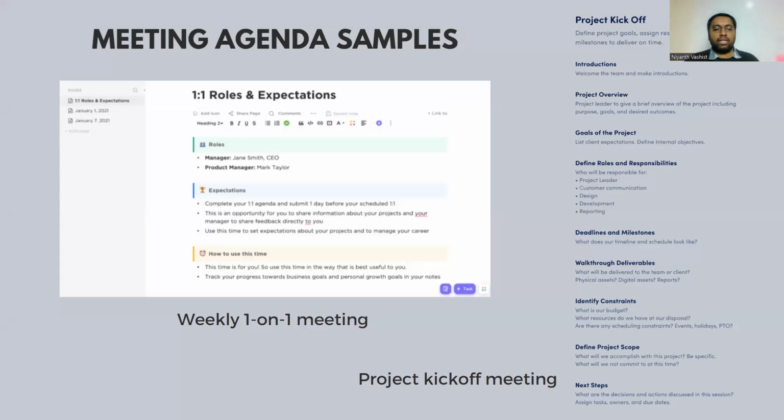Just to give an example, this is how a meeting agenda sample looks like. The roles and expectations have to be given out. So who is coming, who are the people involved in the meeting, and what are the expectations of each team. Let's say the contractor is calling for a meeting between planning, procurement, billing, quality, and safety. If the project manager is calling all these heads or managers or engineers, then each person's expectation will also be put up. What does the project manager expect from the planning team? What do they expect from the procurement team? These kinds of expectations will come up in weekly meetings.